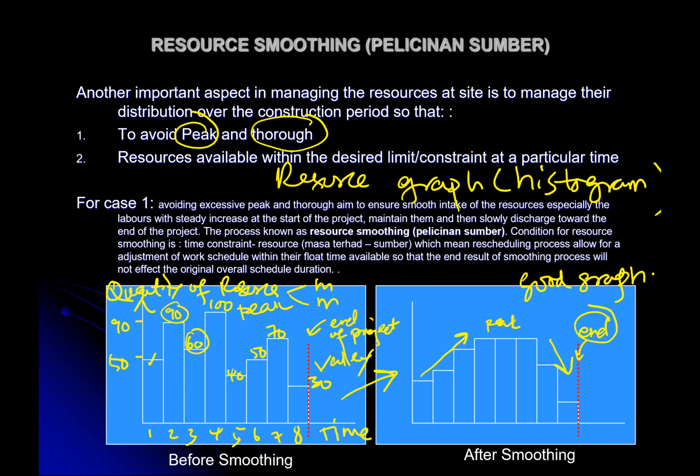Another usage of total float is that we want to play around, or move activities around, so that certain activities can use the early start date, whereas some other activities can use the late start date, and some other activities can use in between, not at the earliest start, not at the latest start, as long as they do have total float values. This is the issue.